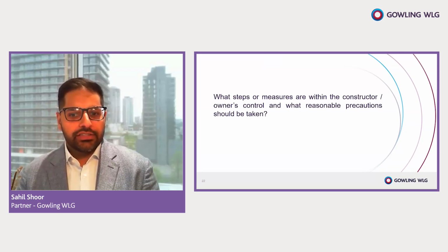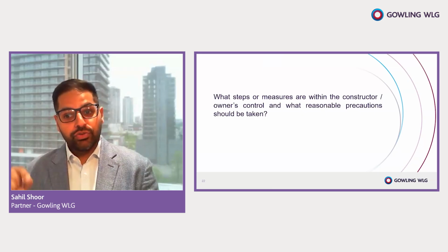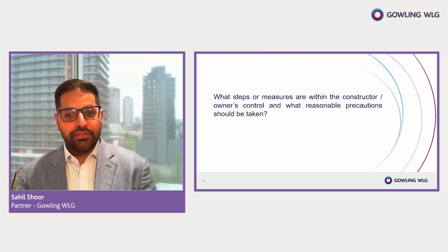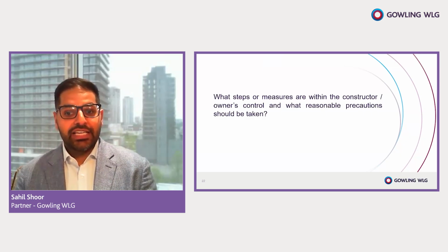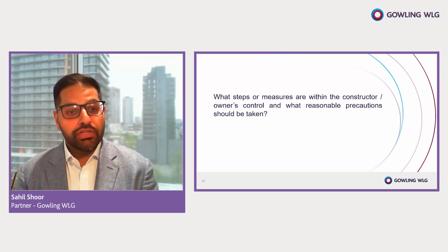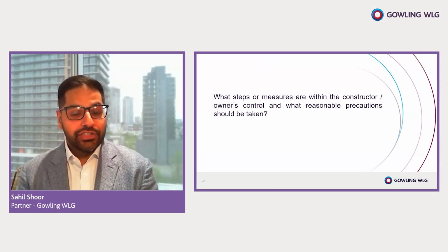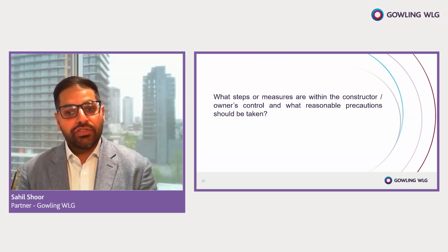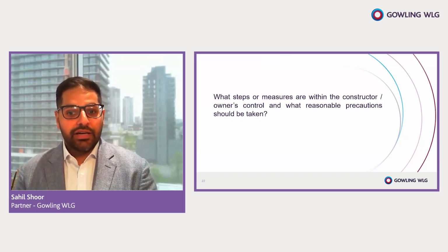Who is in charge of their health and safety? Who's on their team that has experience that is similar to your type of project? What references have you checked on health and safety? What's their health and safety management plan? Did you even ask for one in your RFP? I say that these are the kind of due diligence questions that are going to be much more acutely looked at after there's an incident or an accident, and the Ministry of Labour comes along and says, well, what due diligence did you even do in picking the constructor from the outset?